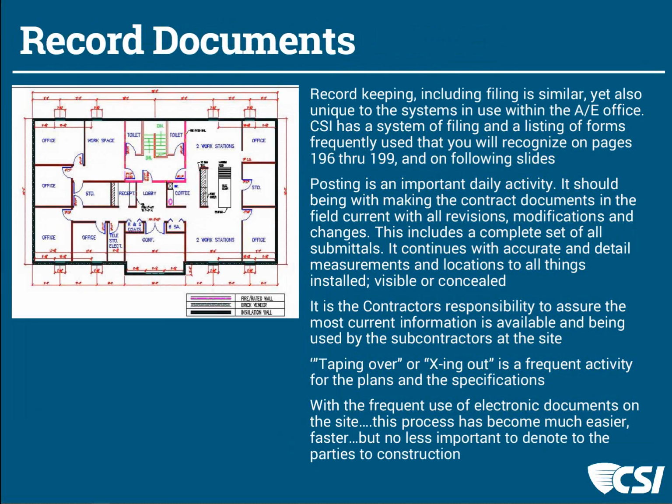And I've seen so many occasions where documents that had been marked up were used for the next project, and because they were accurate, it was a wonderful experience. Also, I've had the other happen where the record documents were not right and things were in places where they were drawn and that's not where they ended up, and it caused real problems.